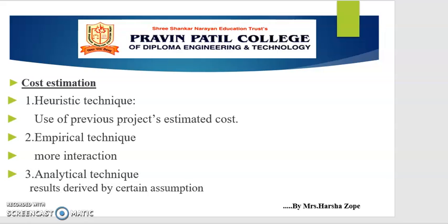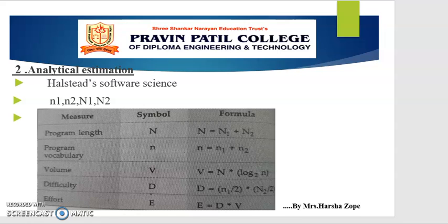The experts again fill out forms anonymously. Again, the coordinator edits and summarizes the forms. Repeat steps 5 and 6 that I have told you, until the coordinator is satisfied. The key to this technique is the expert coordinator. Next is the analytical technique.